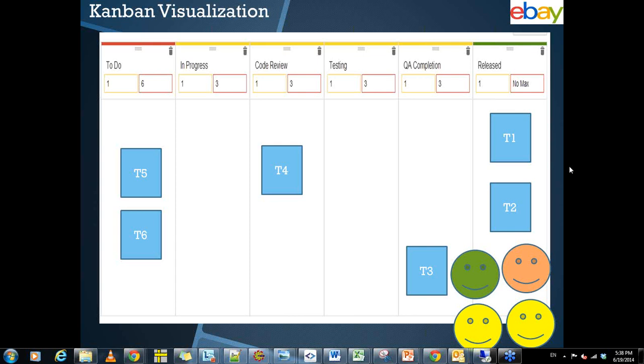Multitasking can be done in the sense that when you have more than one or two engineers, each of them can take multiple tasks. Each one can take one task each. And as you evolve your Kanban board, if you see that for 3 engineers, with a work in progress limit of 3, they become idle very soon, then what you can do is increase the number of tasks per engineer to 2 and increase your work in progress limit.